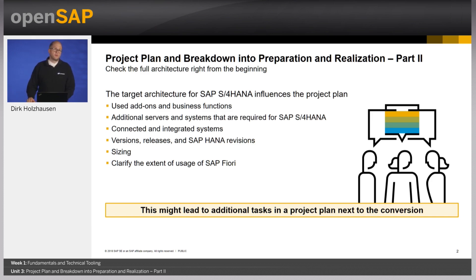Check the HANA revision. Sizing is something that needs to be examined as well — it is specifically required if you move from a non-HANA database (NEDB) to the HANA database. The HANA database must be sized appropriately, so run the proper sizing for it. The application side is also recommended to be validated to confirm that the sizing still suits. This goes along with the usage of Fiori, so consider a check of application sizing considering the new functions leveraged by S4HANA including Fiori. These are activities that need to be evaluated during the prepare phase, as they can lead to additional tasks in the project plan.